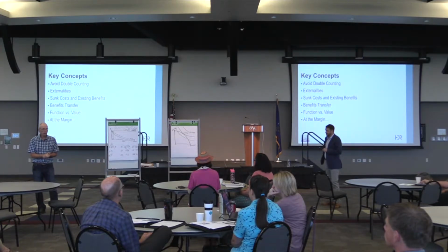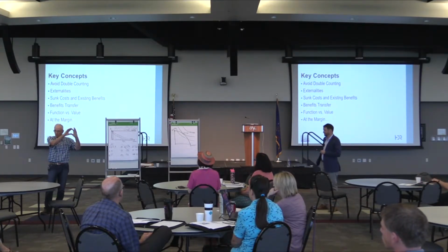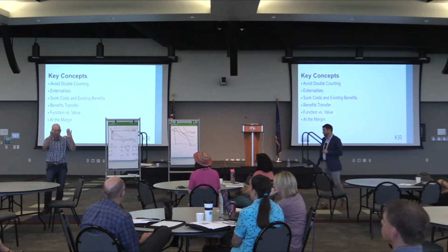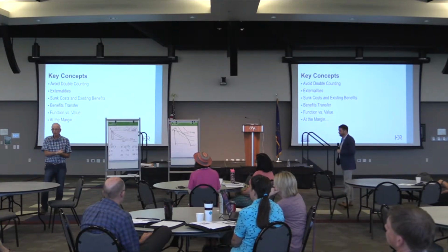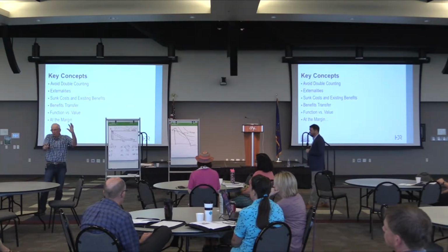Externalities are unintended side effects on third parties. So if we do something in this four-county region in North Dakota that impacts somebody outside the region, from a public perspective, when you're asking for money from the entity of the state, those benefits and costs that occur outside the region are also part of the analysis. If you don't ask the state for money and want to stick to your four counties, then we don't care what happens in Cass County and Sargent County.